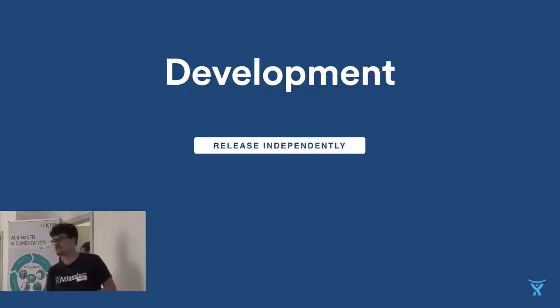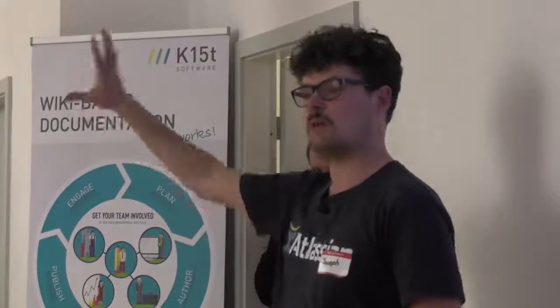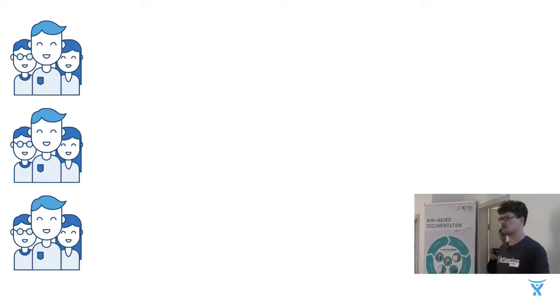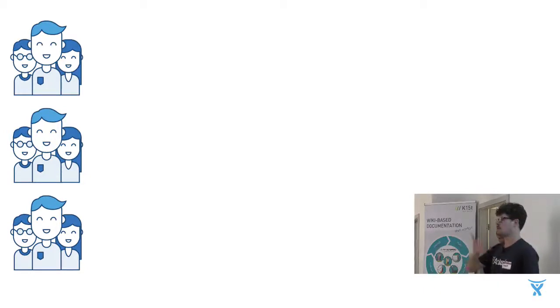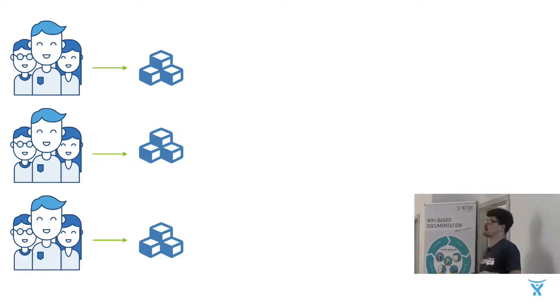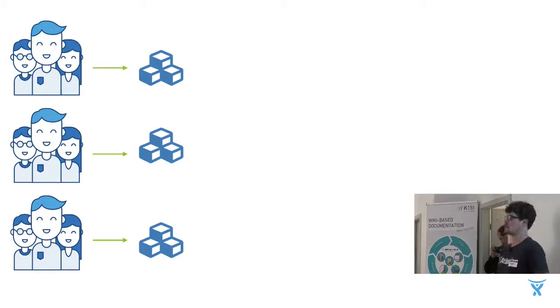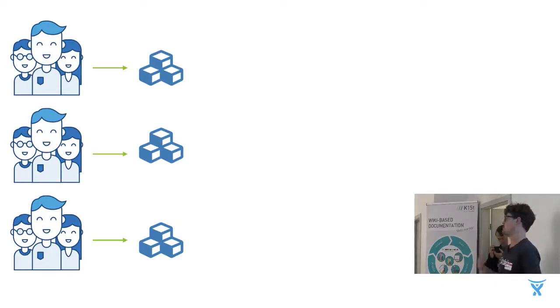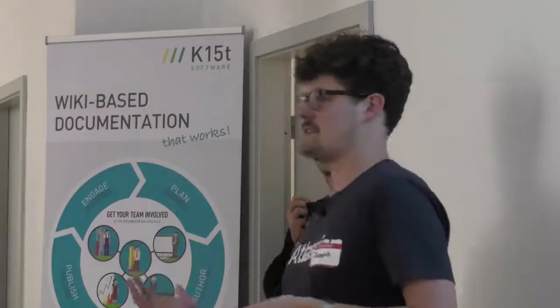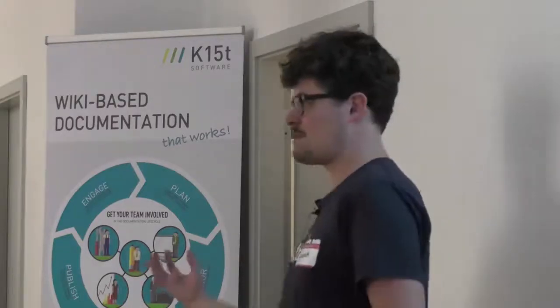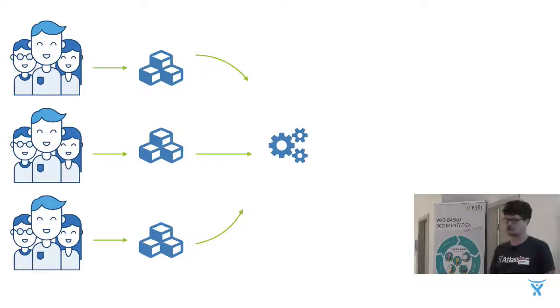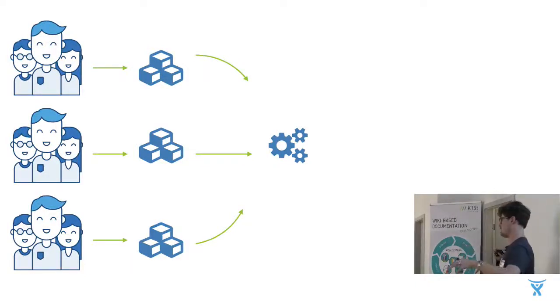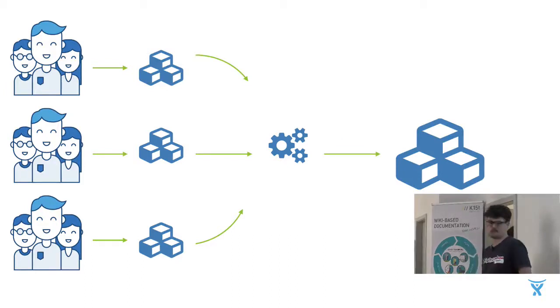So at Atlassian we solve this by encouraging teams to release independently. Instead of having the Jira team with the Jira release, we break it down. We say, instead of the Jira team, let's break that down. We know that Jira's made up of like 10 different modules. So let's have like four teams and this team takes these three, this team takes this three and these two are really big ones. So that team takes those and everyone breaks down that code into smaller parts and then everyone is free to work on that code base independently and in isolation and they can release whenever they want and they're not going to step on anyone's toes. At the end of the day though, we still need to release Jira. So we rely heavily on integration tests and automated testing to take all those different parts that are being released independently and pull them together at the end into a single product that people download.